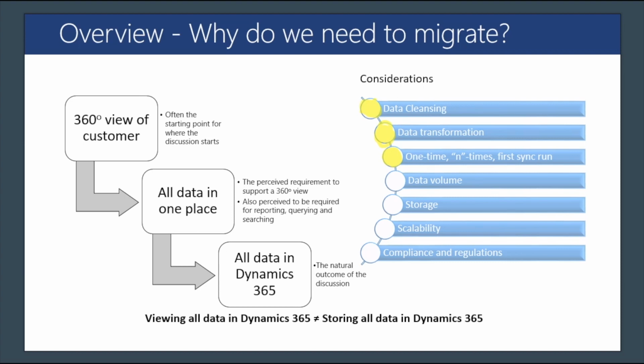And that touches the two next items in terms of data volume and storage. So like I mentioned, the amount of data that you choose to migrate, how many records, what's the size of each record, and how much it's going to consume in that destination system in Dynamics 365 Online will determine how long it's going to take you to migrate, and how much it's going to cost you in the end when you're finally done with the move, and that will be your starting point for your Dynamics 365 instance in online.